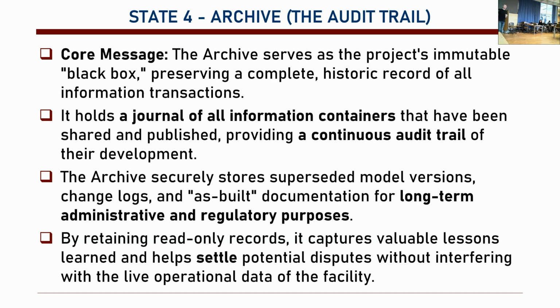Basically, as I mentioned, with the CDE, every process was captured, and we put them in the database, so we can use it for long-term administrative and regulatory purposes. We can also create as-built information, like we make scans, we can also embed the construction data, the model numbers of things, the physical basic representations of the real thing. As a result, these are read-only records, they cannot be altered.